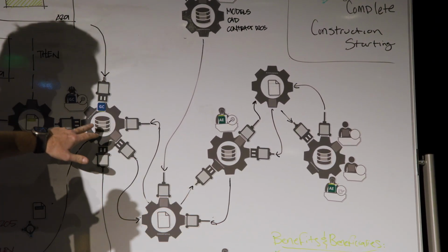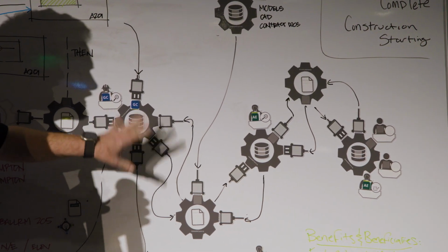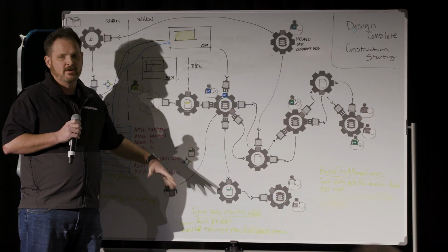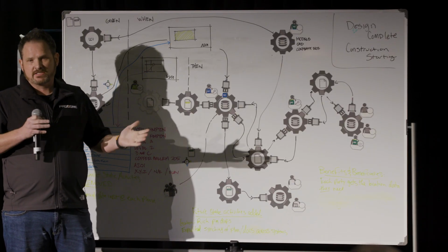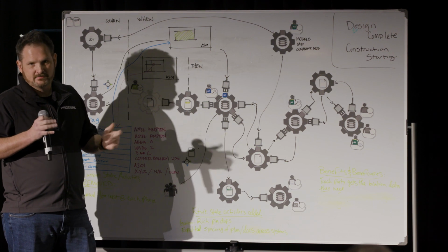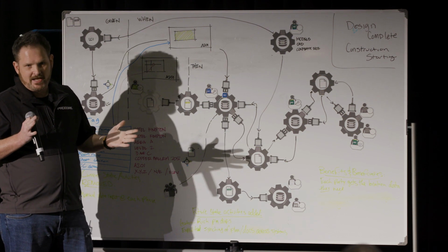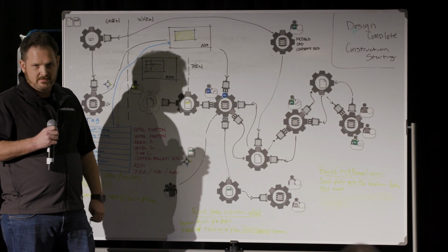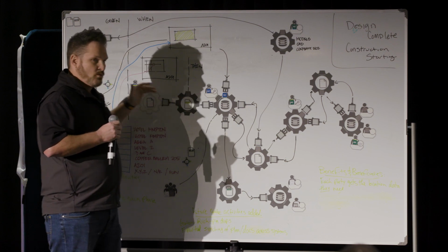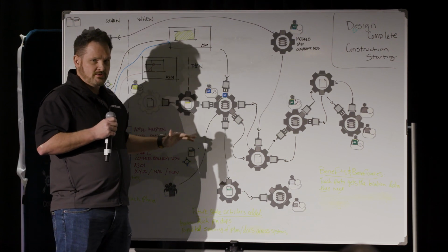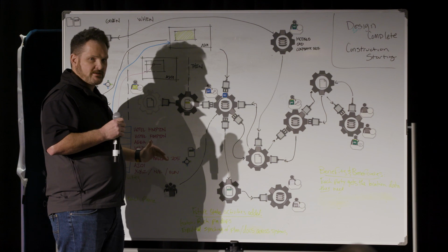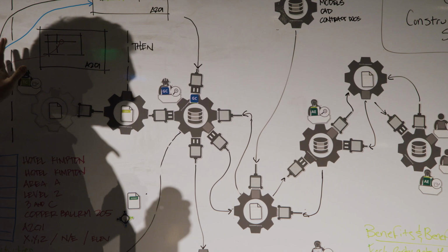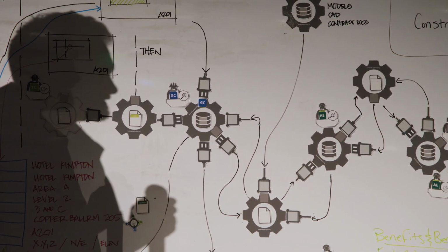And so when that comes back through, it's already enriched. We have all that information in there. So when it gets distributed, right now we've all been on projects where the GC gets an RFI, and everybody gets the RFI. But you get 30 emails a day of all these RFIs, and then you're supposed to go through and see if each one impacts you. But if you knew where it was location-wise, plus what drawings it was associated with, and there were E-sheets as part of this, then you as the electrical contractor would look at that. If you just saw an A-sheet, you'd be like, meh, maybe, right?